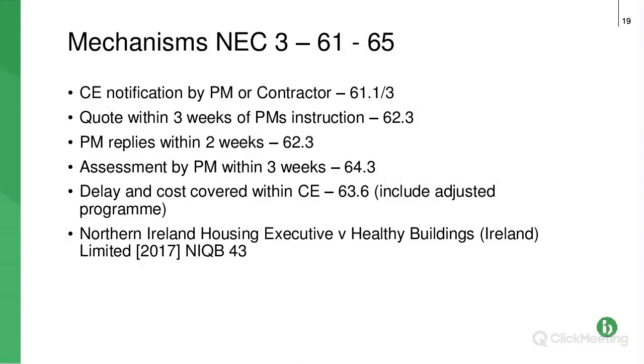the day, if you're going to dispute resolution, it doesn't matter what you said in your quote. What the court is interested in, what an adjudicator is interested in, is what your actual costs are. So just be aware of that, and it's why the evidence, the documentary evidence, is so important. And you can't just rely on we've given a quote. So that's our substantiation for this claim.